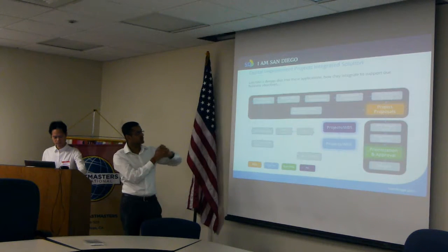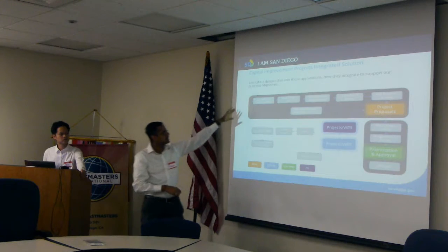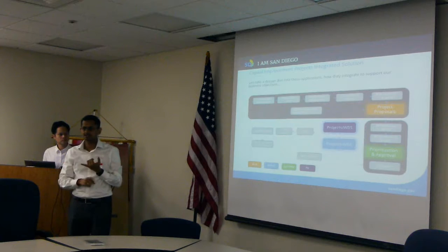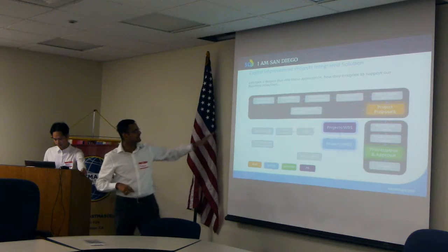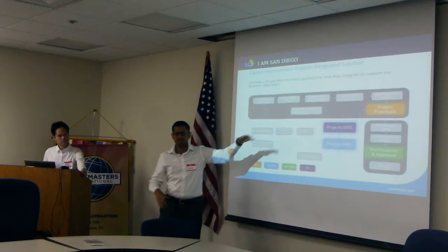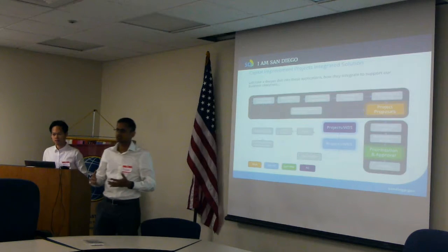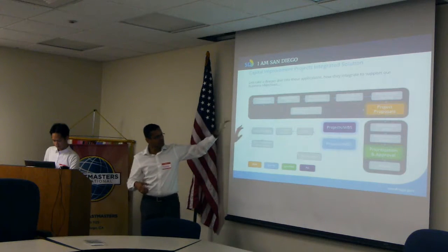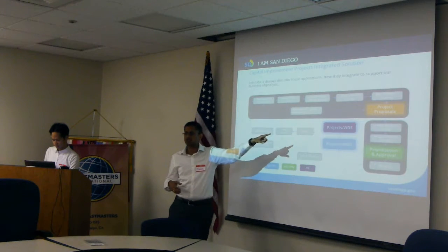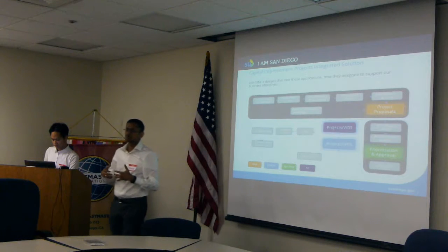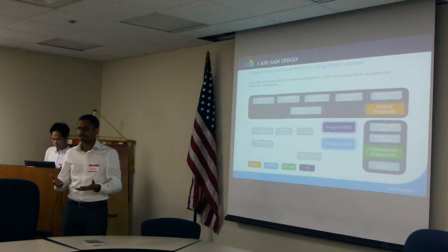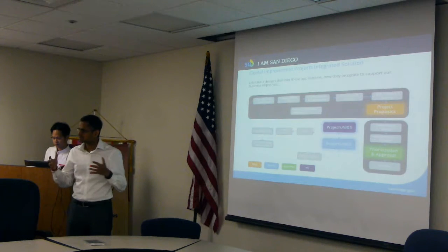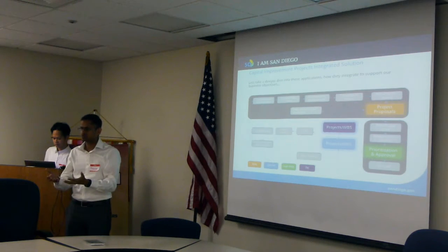Like I was talking about when I said Riva, Riva has information about all the assets that the city owns. Where does the asset lie, condition data. It also has new infrastructure needs list, like if the city wants to build new infrastructure, build new assets, all of this information is fed into Riva. Riva groups all this information and creates something called a project proposal, where it says, for your year FY18 or FY19, you've got to work on this particular asset. Take this up as a project. I'm proposing this project over to you.